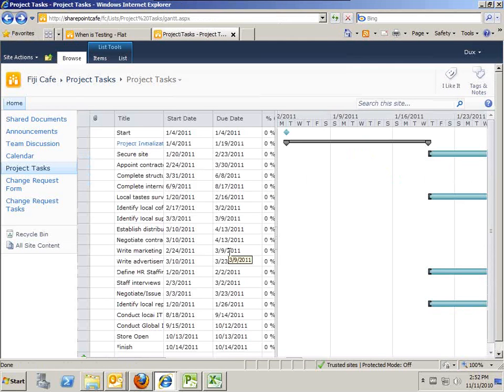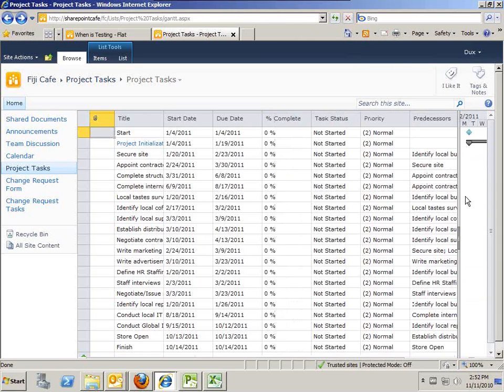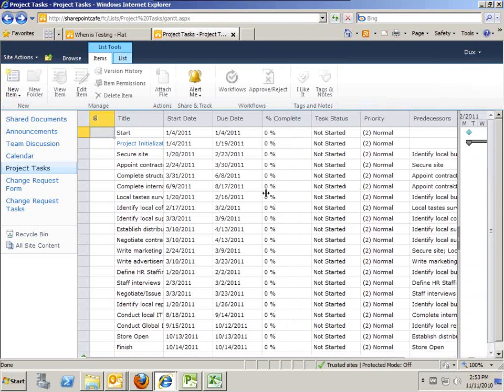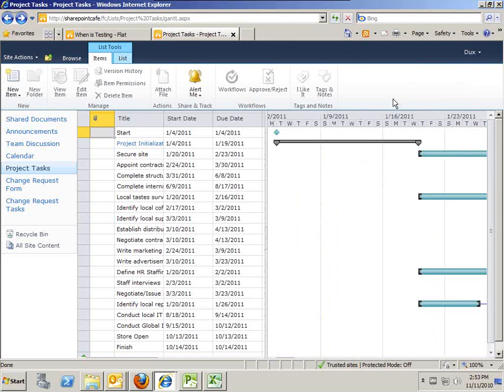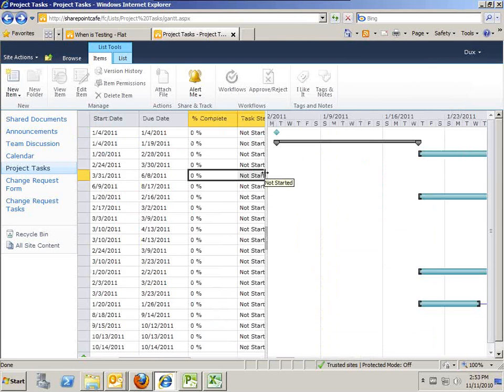Let's stop for a while. The idea now is, as a PM, I can publish the schedule. It's going to be available on my project site. All the resources that are assigned to these tasks, and so happens it's me for all this, I could have hidden all the other stuff. They would come here on a regular basis, once, twice a week, and put their updates here.